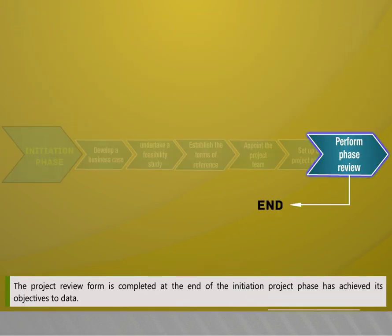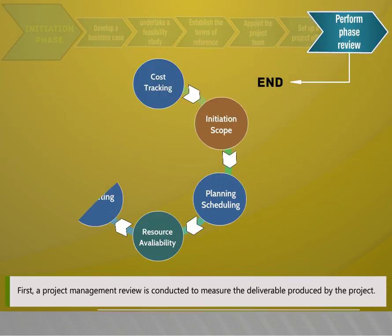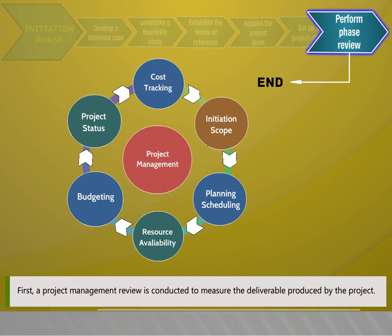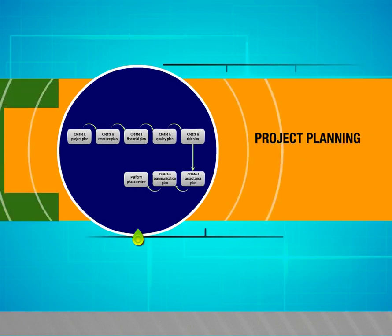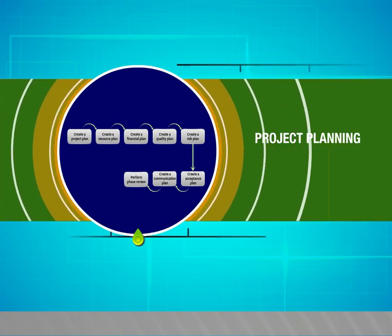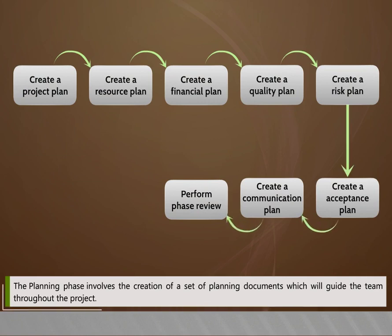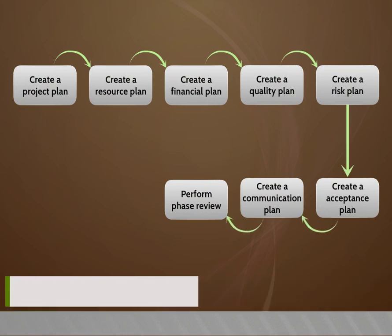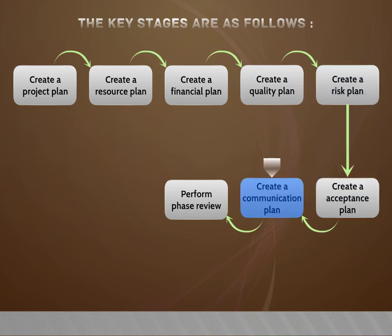The project review form is completed at the end of the initiation phase to confirm it has achieved its objectives to date, and a project management review is conducted to measure the deliverables produced. The planning phase involves the creation of a set of planning documents which will guide the team throughout the project. The key planning documents are: project plan, resource plan, financial plan, quality plan, risk plan, acceptance plan, and communications plan.